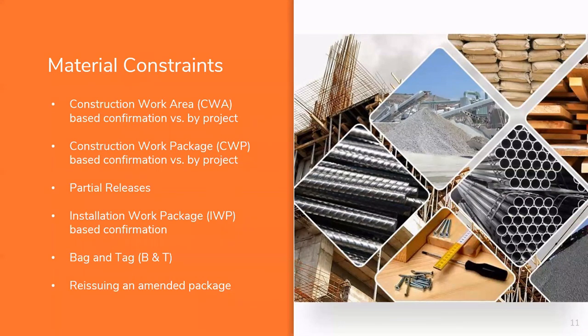So the actual size of the packages has to make sense for what building you're doing. And when we talk about resource confirmation, especially materials, one of the best ways to do that is through bag and tag. So we look to see what does the package say that we need. We get down to a very granular level. We're looking now at everything that's required to do the build. And then we bag and tag those materials so that when we put them to the crews, they have everything they need to be able to do the construction.